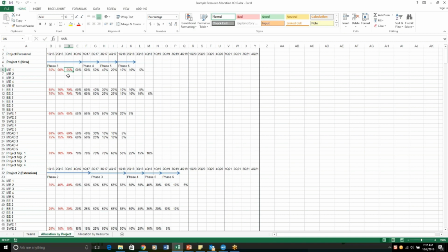It really doesn't matter, in my opinion, whether this person spent 55% or 52 or 58. That's really not the point. I think plus or minus 5% is probably close enough in terms of granularity. You're really just looking at that kind of level. But as a manager, it's really important because if suddenly this is projected down to 5%, you're going to ask why. Or if it goes up to 90%, you're going to ask why. But it's a really nice way to make it visible.